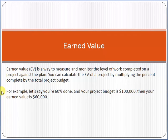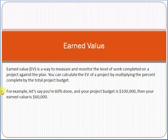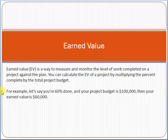Another example: you are implementing an e-commerce solution for a customer and you have planned that 10 tasks you will complete in 10 days — that means one task per day. In actual, when you analyze after two days, you realize that only one task is completed in two days. You planned that two tasks would be complete in two days; however, only one task is completed. So your earned value is one task. Earned value means what you actually earned — what you actually received.